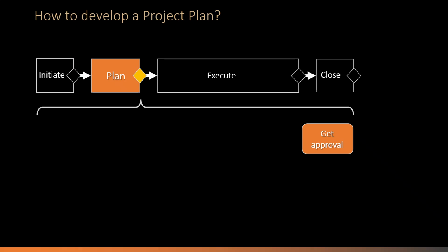If the project will be delivered by a project delivery team, it should not be planned by the project manager alone. That's why before real planning starts, the project manager should onboard the project team members named in the project charter and involve them in project planning. After the project planning team is assembled, development of the project plan can start.